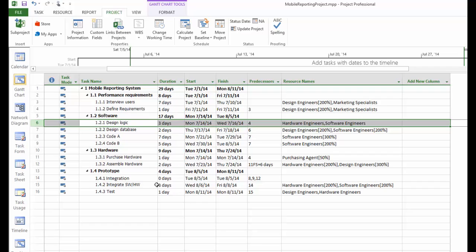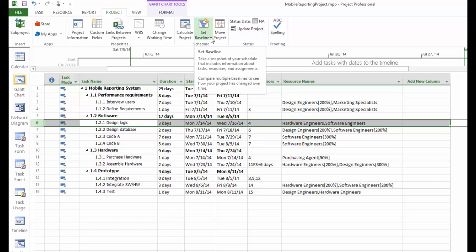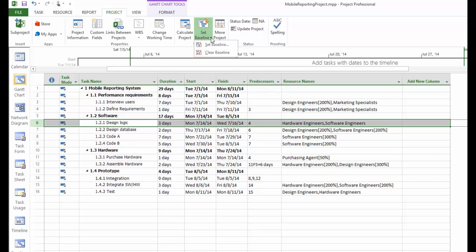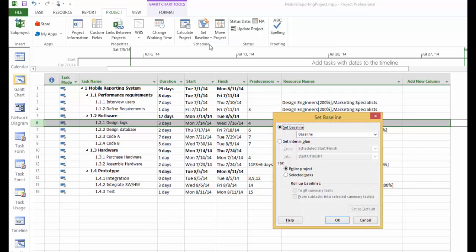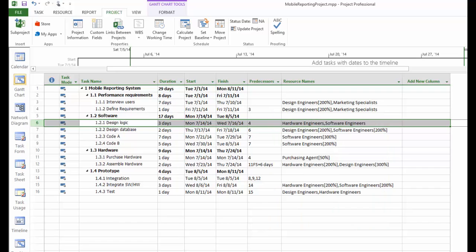To do that, make sure you're on the project menu and go to set baseline. Use the drop-down box. If you have a baseline set up before, you can clear it up. But if this is the first time you set up a baseline, you can do set baseline. And in this window, you can do set baseline for the entire project and click OK. Now we have a baseline of the project for the tracking process.